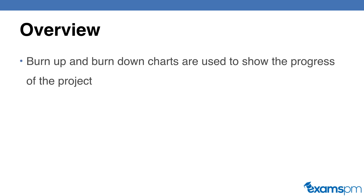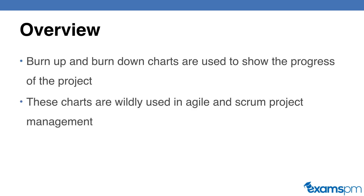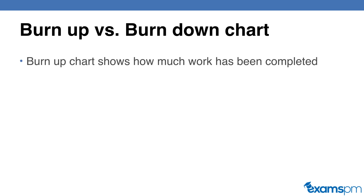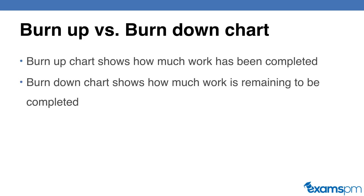Now let's go over an overview first. Both the burn-up and burn-down charts are used to show the progress of the project. These charts are widely used in Agile and Scrum project management, and they have recently been incorporated into the PMP exam as well. Both of these charts will show you how much of the project you have completed and how much you have left to do. The difference is that the burn-up chart shows how much work has already been completed, while the burn-down chart shows how much work is remaining.